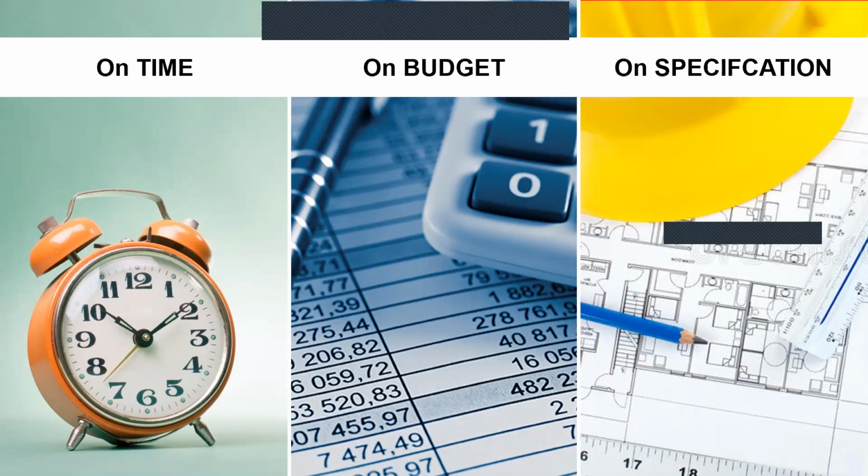Once they control the time, another factor was it should be within budget. And if you are not on time, the inflation will keep on increasing. You will have more money to invest in the raw materials. So if it is on time, they saved on the budgets, as well as they calculated the material, because the BIM model was available. They can do volume calculations, trajectory analysis, verticality, as well as the clearance analysis of the building. And subcontractors also can start working on partially constructed sites for the second or third phase of the buildings. This helped them stay on budget.